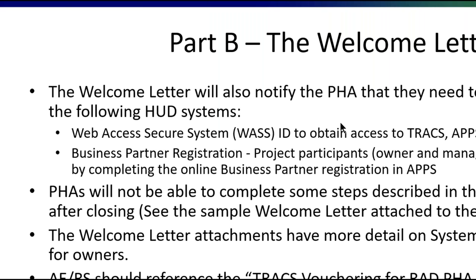Business partner registration must be completed as soon as possible online in the APPS system, and that will prompt them to get started to prevent delays in the future as we move ahead with the conversion. The PHA will not be able to complete some of the steps on the welcome letter until after closing, but we encourage them to do as many as possible so that they're not behind when we actually close the transaction. The welcome letter will have attachments with more details specifically for each system's setup requirements, so that they can follow through and refer to them.